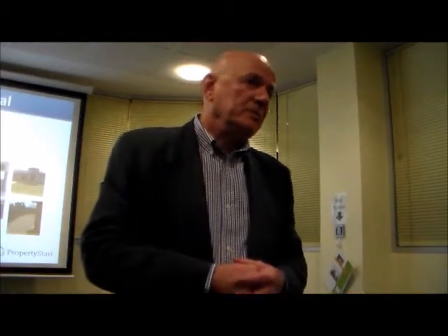We'll change that, resubmit the plans. Once they've got it and they're totally satisfied, we then get another letter called an NOD. That's a Notice of Decision to Issue a Planning Permit. At that stage, you then go into council, or the client goes into council, pays the advertising fee. They give you a great big sign which you've got to stick out the front of your property, and there's a 2-week waiting period, waiting to see if the neighbours jump up and down or if anything happens, and we're hoping at this stage that none of this happens. At the end of the 2 weeks period, you've got yourself a planning permit.